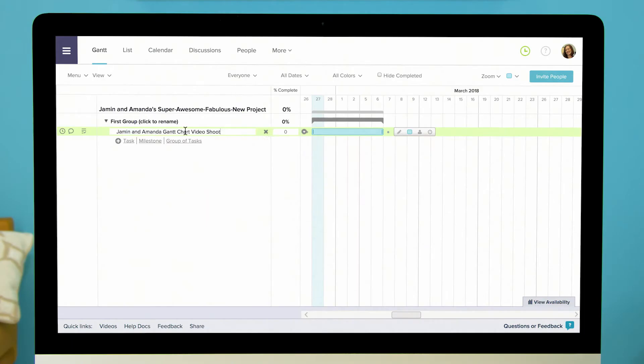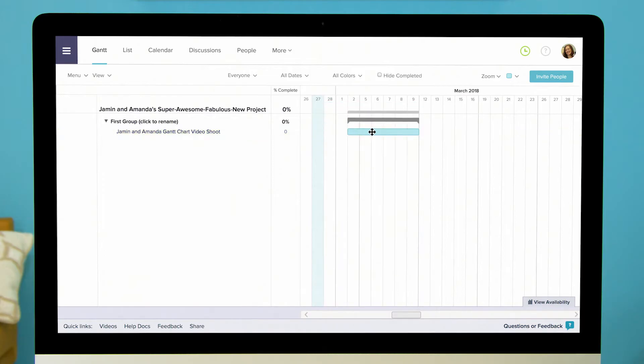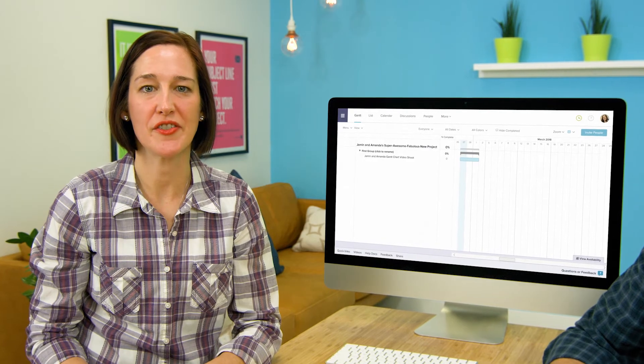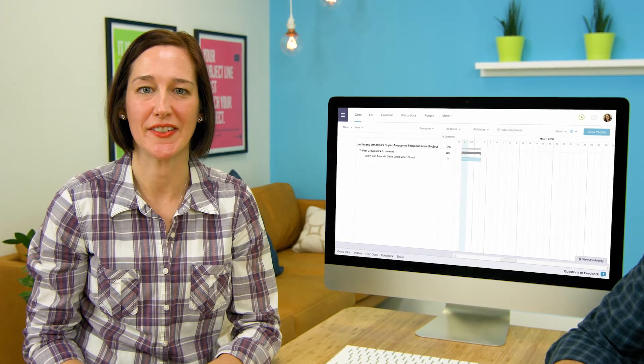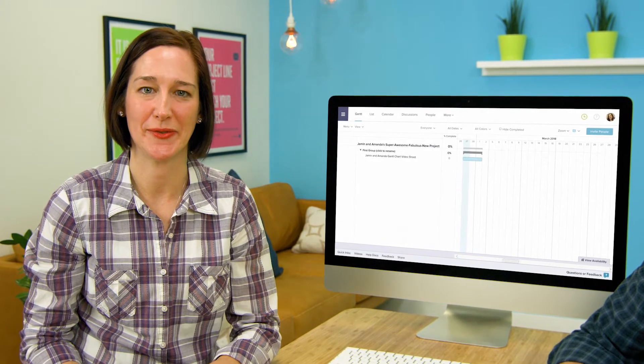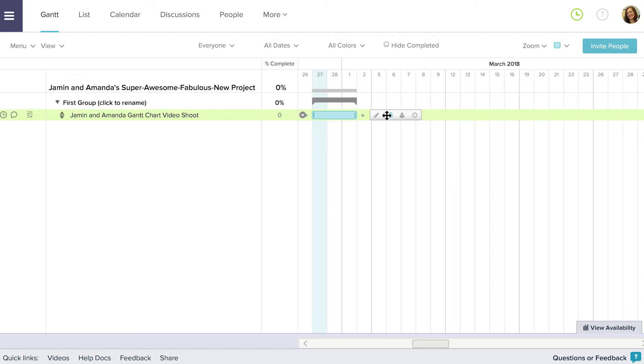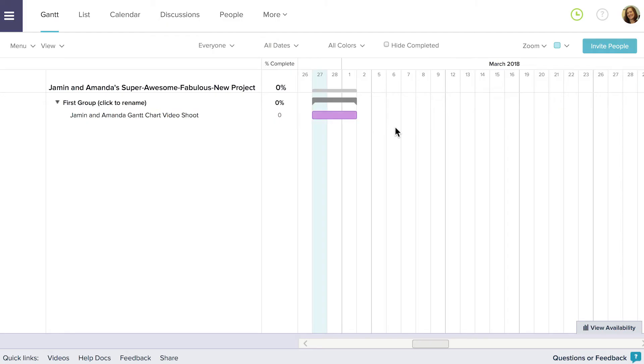That's true. Once you have it named just drag it to wherever you want to schedule it in the timeline and resize it to adjust the duration. If you want to change your task's color that's easy too. Just mouse over the task and click on the color icon that appears to the right. Select the color you want your task to be and it immediately changes to that color.